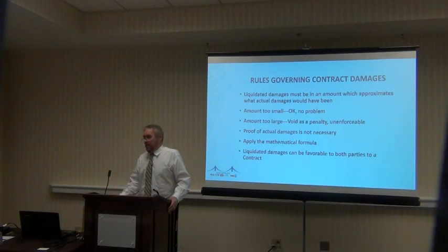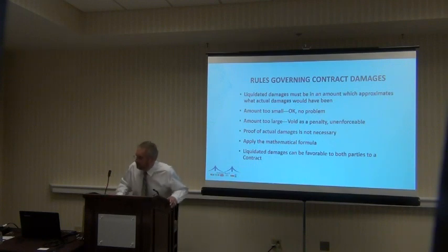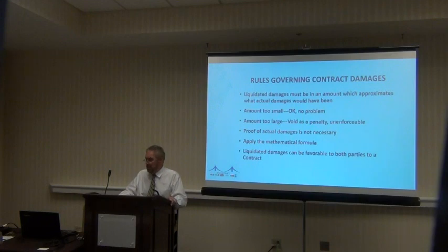You know, flyover, for example, here was $5,000 a day liquidated damages, unlimited per day. But then there was a bonus on the other side for $5,000 per day if you finished early, for every day, up to 100 days.